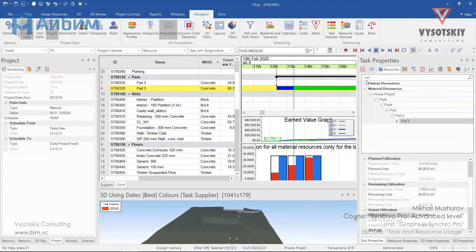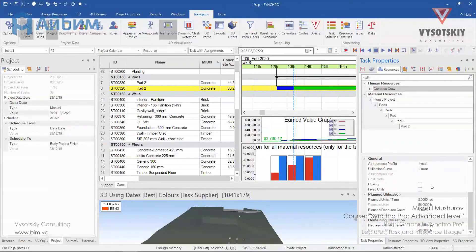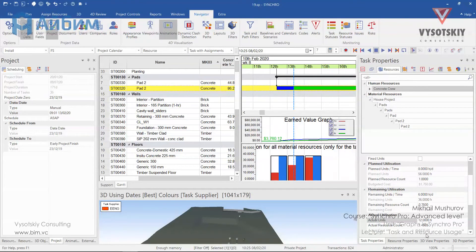As for human resources for the concrete crew, remember that we have them as not fixed units — it's the same principle. Your input is actual units. You've worked half more than you planned. You can see the actual cost, remaining cost, at-completion cost, along with the remaining units and remaining productivity.